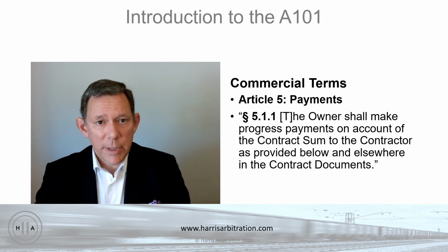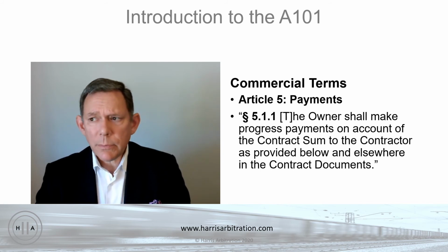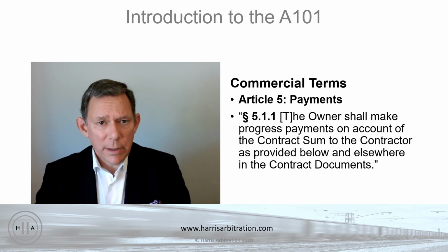And so in my skyscraper example, even though the contractor is incurring all sorts of costs to hire subcontractors, et cetera, and do the work for a $50 million skyscraper, the contractor gets no money under the common law rule until it's substantially complete, right?